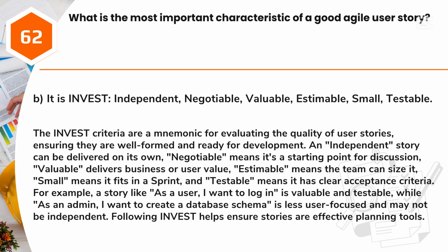For example, a story like, "As a user, I want to log in," is valuable and testable, while, "As an admin, I want to create a database schema," is less user-focused and may not be independent. Following INVEST helps ensure stories are effective planning tools.